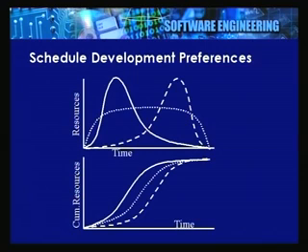So, again look at the slide, we can say that we can now have another particular curve. Here in this diagram, you see that instead of all the activities being performed as early as possible, we have now performed all the activities as late as possible without delaying the total time required for completing the project. On the cumulative curve below, you see a typical hysteresis kind of curve, and this can, from an accountant's point of view, be very easily viewed as what we call interest cost to the project, the additional interest cost to the project.